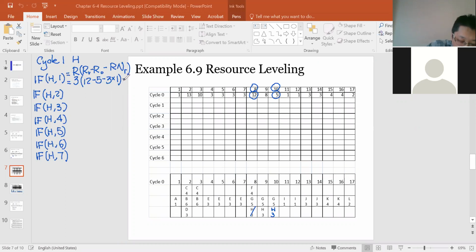Then this is the calculation. The calculation result gives us 12. As I mentioned, if it's a positive number, that means this type of shift is improving the efficiency of the whole system. If this number is negative, then it's less efficient. If it's 0, there's no change in efficiency. Okay. Professor, how do we get 1 for the NR? Oh, how did you get 1?